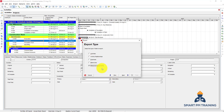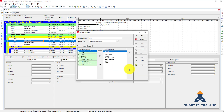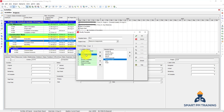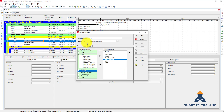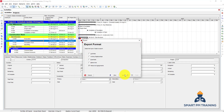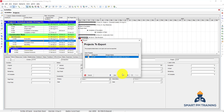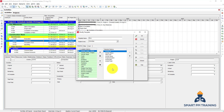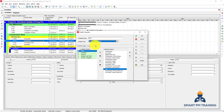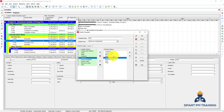You can also do the export of resource assignments. You have the resource type and anything beneficial to resources, including dates for activities. You can also choose more than one subject area at once — for example Activities, Activity Relationships, and Resource Assignments. Click Next and you will see the list of subject areas you selected: Activities, Activity Relationships, and Resource Assignments. For each one, go in and set up your template with filters and sorting.